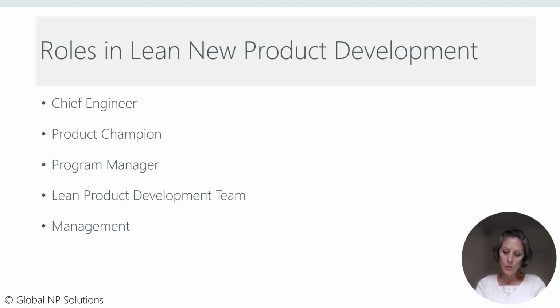Working team members and workshop participants must be limited to those that are actually contributing to the tasks and activities of the project. In functionally organized companies, as the number of team members grows above about a half dozen, the dedication to a project can drop below 10%.